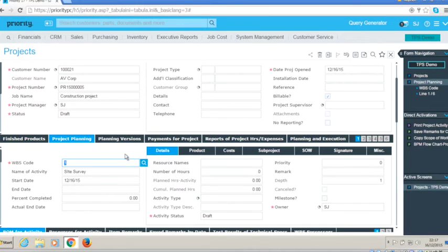On any row, so for any of the activities, if I take a different view so that I can see just the fields that apply to that activity, most importantly, we may well want to start allocating resources, plan a number of hours for the activity, set an expected end date for the activity for scheduling purposes, and each activity can have its own status. But also we can set whether the activity has a milestone, and the result of that is that billing will be prevented for, for example, sub-activities until the relevant milestone has been marked as 100% complete.